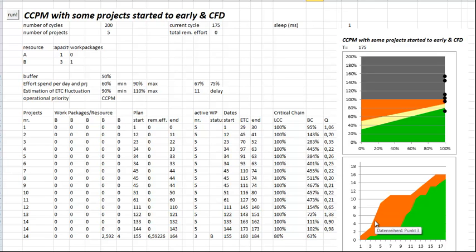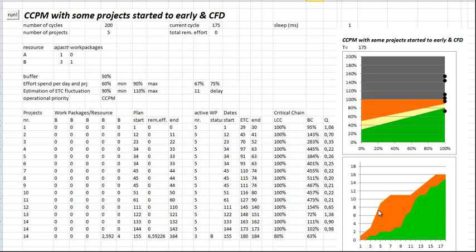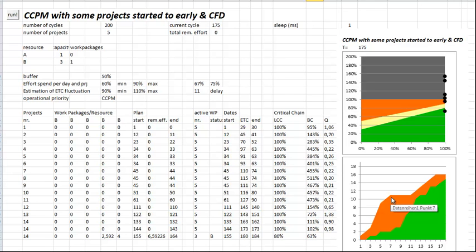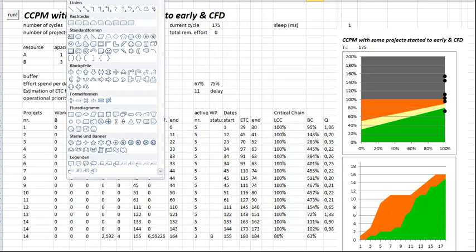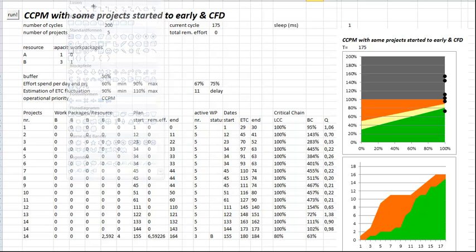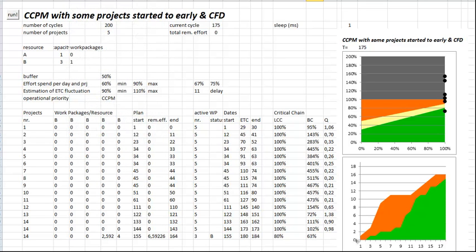You see immediately if you start too many projects the lead time, the mean lead time, is growing rapidly. After a while I stopped starting, that's here. In that moment you stop starting new projects the lead time is going back to normal.